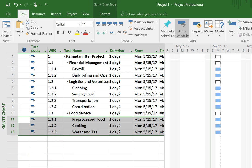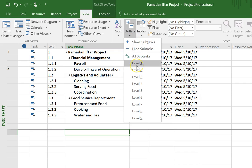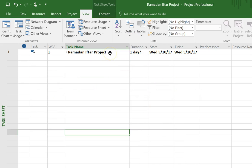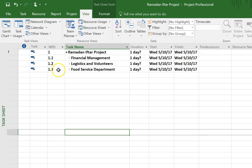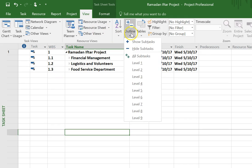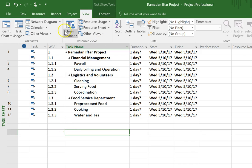Let's see how that looks. The way I like to check is to go to the View tab, go to Outline, and see what is at level one. Now PMI calls this level zero in a work breakdown structure, but in Microsoft Project it shows as level one — that's the highest level Microsoft Project has. So we'll use Microsoft Project's terminology. There's my level one, here's my level two: 1.1, 1.2, and 1.3. I can also show all sub-tasks to see everything at all levels.